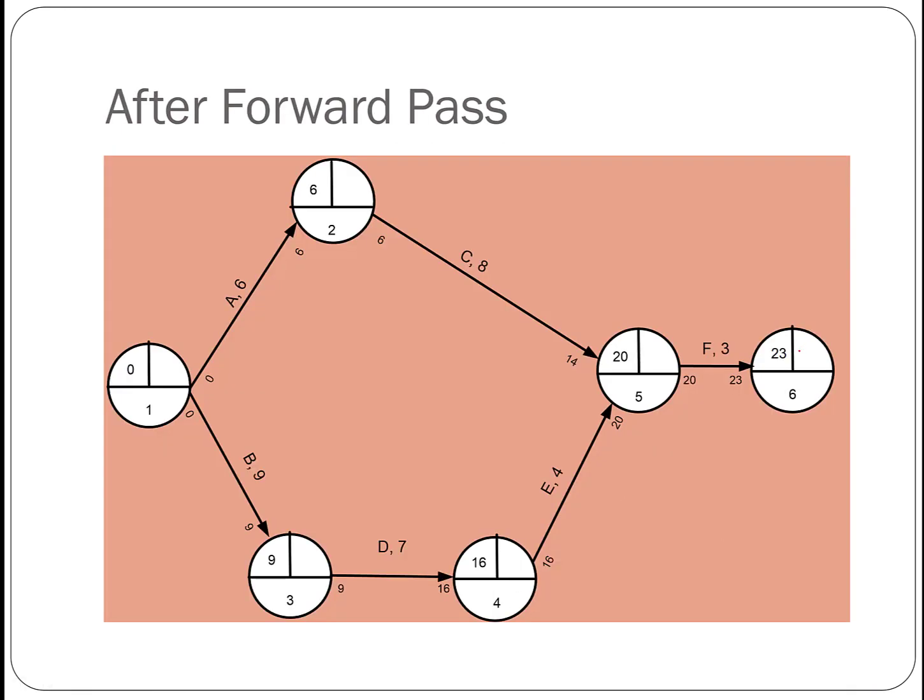So now we are going backward. This terminal node, which is the completion of our project, is going to have the same late time as the early time.